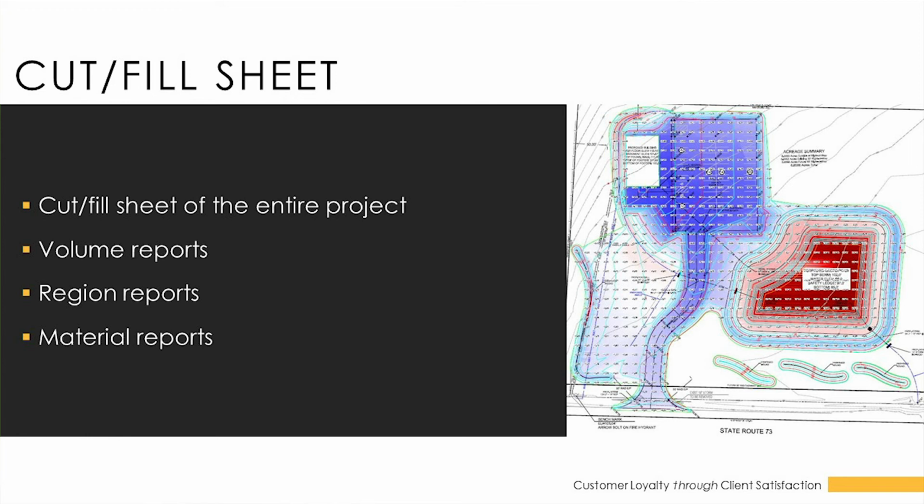Then we can prepare a series of reports showing the volume and the area of the cuts and fills of the material being used on site. We can create a series of region reports to isolate specific areas.